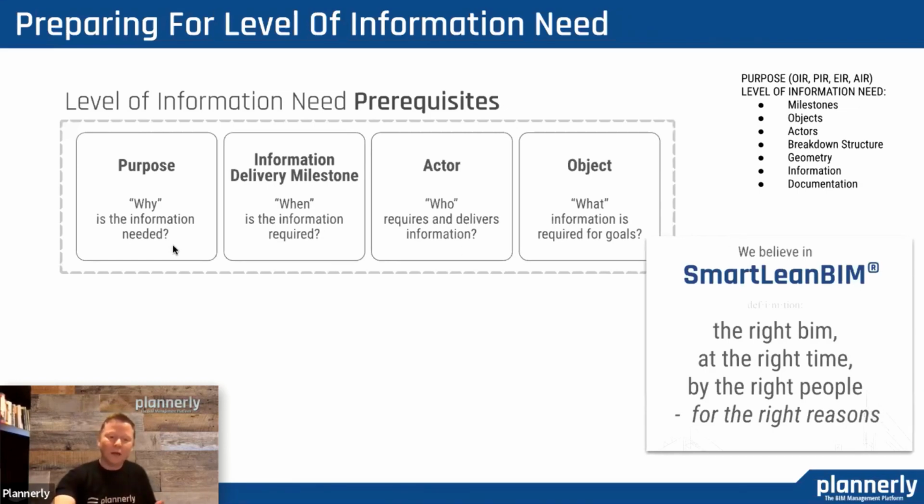So why are we going to do BIM? What is the information needed for? What's the purpose? And being able to define that and describe it, being able to define when this is going to occur, so the milestones along the way, who is going to be requiring the information and delivering the information, and what the objects are or what the items are that are going to meet that set of goals.